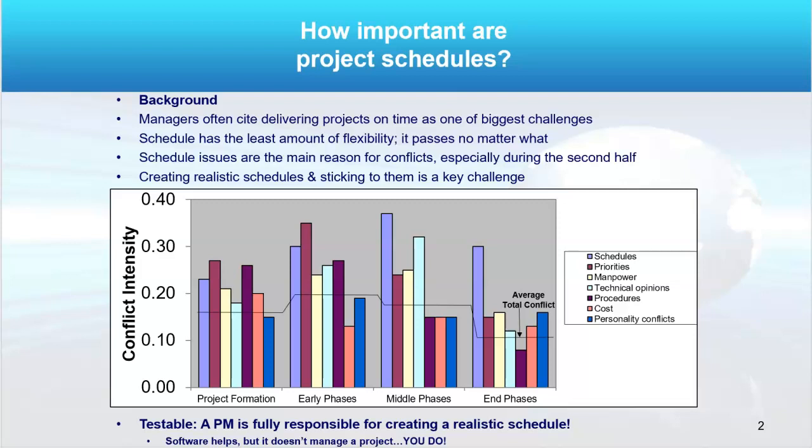How important is a project schedule? Let me tell you, pretty darn important. You can see in this chart that in the initial stages of the project, the schedule is pretty darn important. By the early phases, it's the second most important issue in a project next to priorities. By the middle of the project and for the remainder, it is the number one challenge. So keep that in mind.